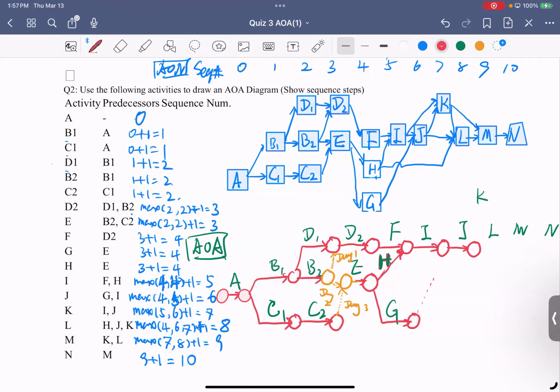So can we add a dummy here? Can you see that? Do we need a dummy there, from G to J? Yes, because J goes to K. Can we remove this dummy? Probably yes. G goes to J, we need G that goes to K. Okay, so you guys see we need this dummy, right? Yes. But right now it should not be in this good position. So let's leave it there and let's see what happens.